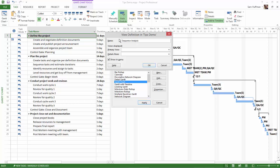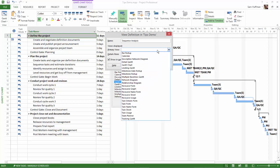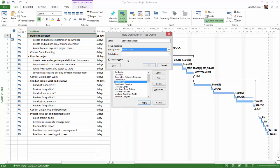The primary view, and again this is my preference, is I like to see the Detail Gantt on top. The Detail Gantt is designed to show slipping and critical path, and if tasks can continue to slip or not.